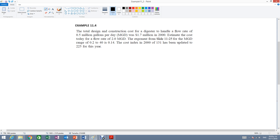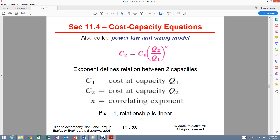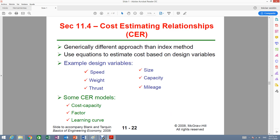There are three different elements given in this problem. We have dollars, so that means we have a cost. We have the indexes just like in example 11.2, but we have a new element: million gallons per day. This million gallons per day is considered the capacity of the digester. Whenever you see capacity, that means you're going to be using the cost capacity equation to solve the problem. The cost capacity equation falls under cost estimating relationships because these equations estimate cost based on design variables such as capacity.